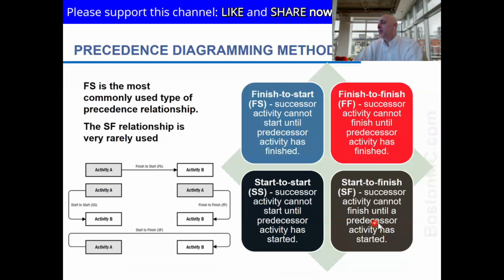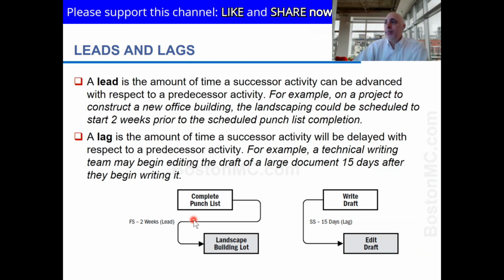The only one that I didn't cover is start to finish, because that's hardly ever used in project management. It is saying one activity has to start before the other one can finish. Don't try to come up with examples for projects. There really isn't too many of those. And PMI tells you it's barely ever used. But I can think of rotation and shifts. Let's say nurses in a hospital, the second shift nurse has to start before the first shift nurse can leave, right? Cashiers also, the second cashier must start before the first one can leave. So they have a start to finish. When you start, I can finish up my work and leave. That's in operational shifts.